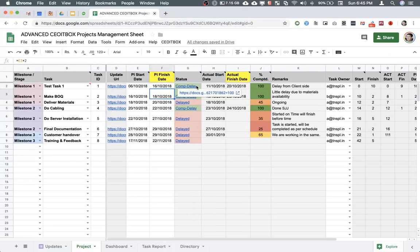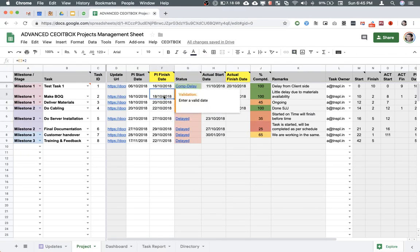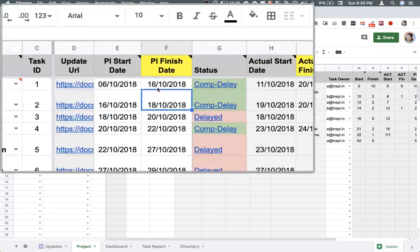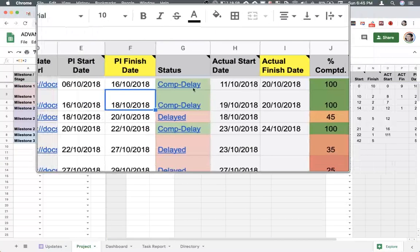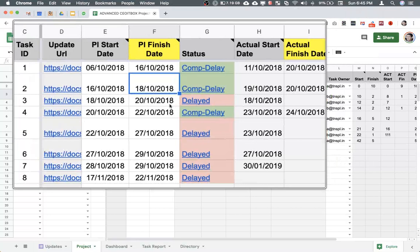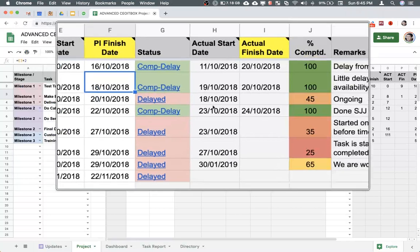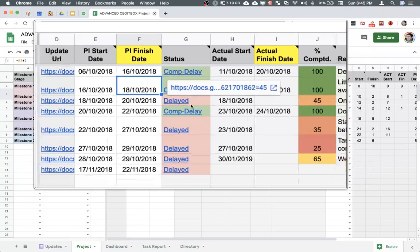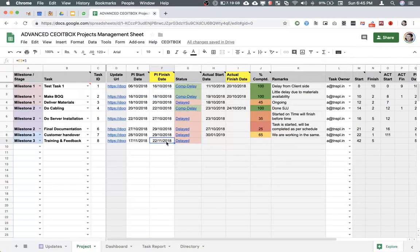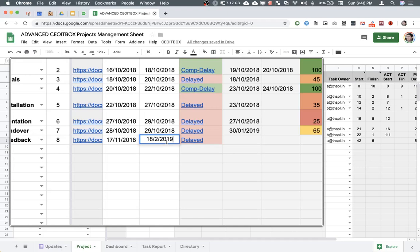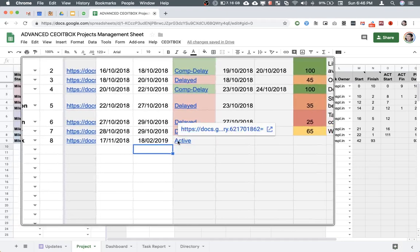The status of the task, whether it is completed with a delay or completed on time. Any task that is completed on time will be marked as completed. If it was supposed to be completed on October 16th but was completed on October 20th, it says completed with delay. And this task was supposed to be completed on October 20th but has not yet been completed, so it is marked as delayed. If I were to enter February 18th, it would show active.